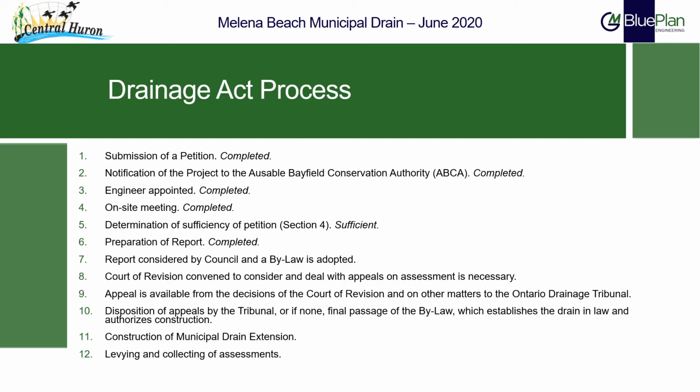The Drainage Act is a vehicle by which a drainage scheme can be constructed and the cost raised by local special assessment. That is, the cost is assessed in varying proportions to lands within the watershed as a one-time charge over and above any taxes paid. Maintenance of the drain is likewise charged to the watershed, often in the same proportions as the original construction.